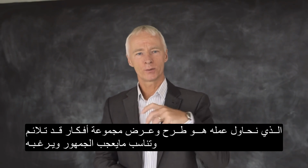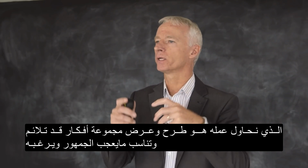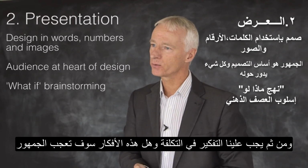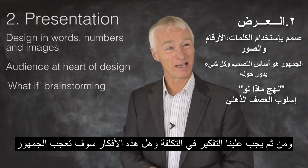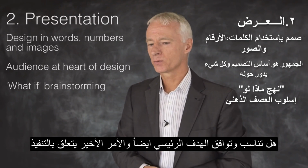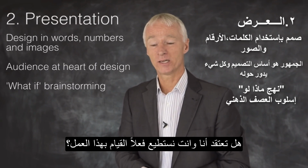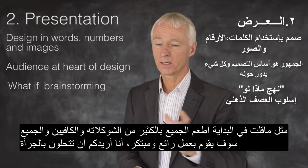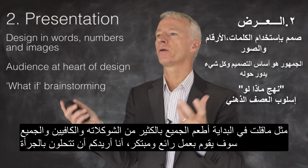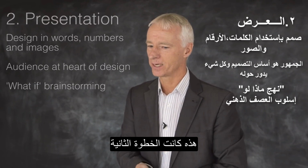And what we're trying to do is to come up with a whole bunch of ideas that fit the audience, fit what they might like. And then we need to think about how much they might cost. We need to think about whether the audience actually likes them. Does it actually fit the original purpose as well? And the final thing is just an operational thing. Do you think you and I could actually deliver it? So as I said earlier, fill people full of chocolate and caffeine and actually they get very, very creative. So I want you to be brave. So that's the 2nd step.